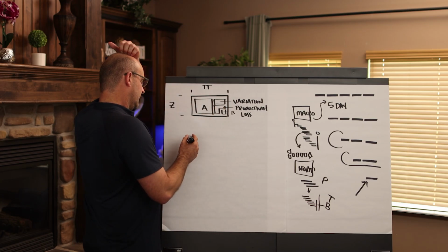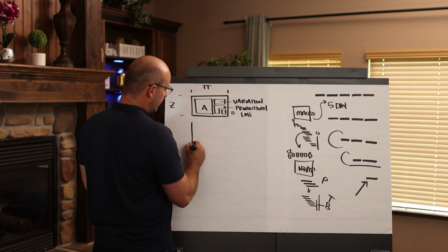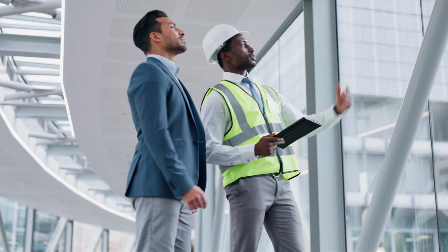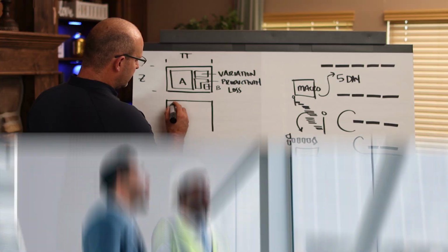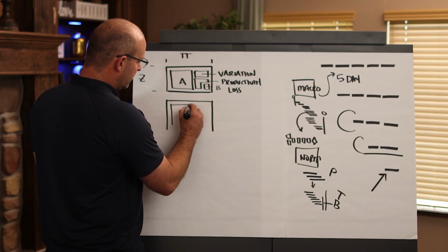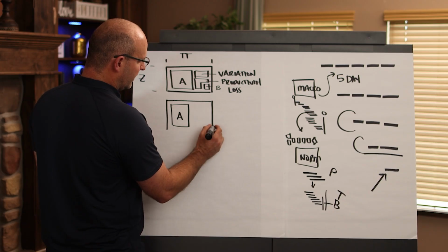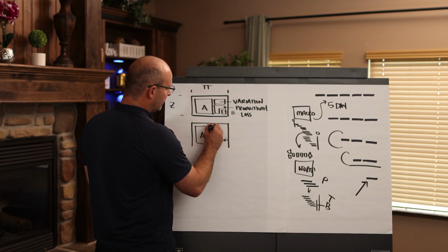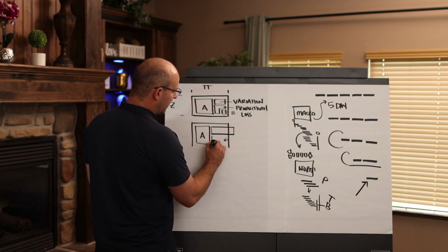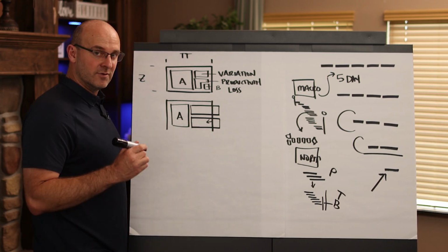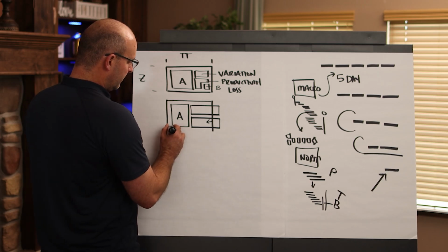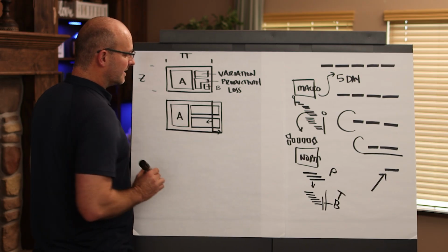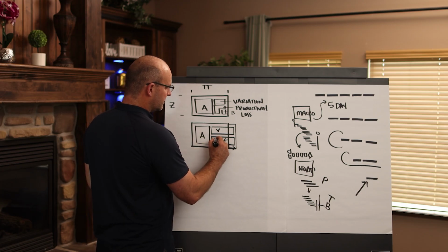Now, here's the thing. When I say additional people might not make your work go faster, let me draw this for you. You would think that if you add more people to something, your activity time would be smaller, and therefore this whole thing, this line right here, would move in. But actually, when you add more people, because you have more variation, and because you have more loss of productivity because you have non-onboarded, non-ready people coming to the project site, this line extends, and your in-zone cycle time will extend. So again, this is variation and this is productivity loss.